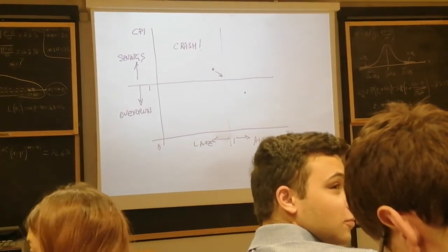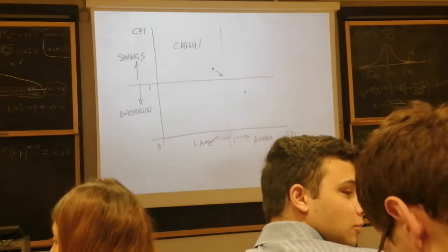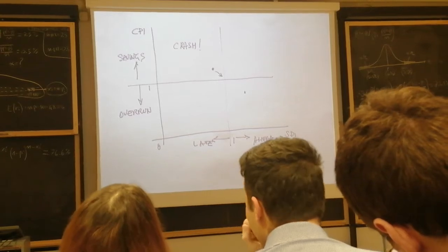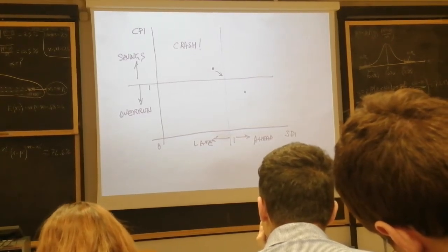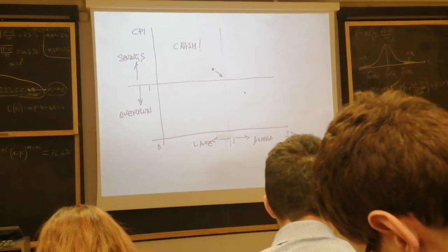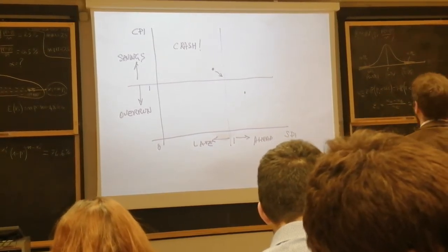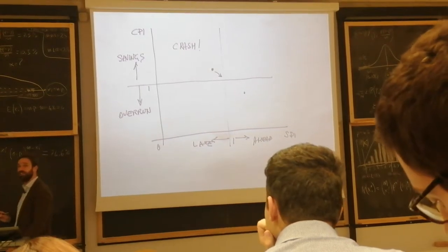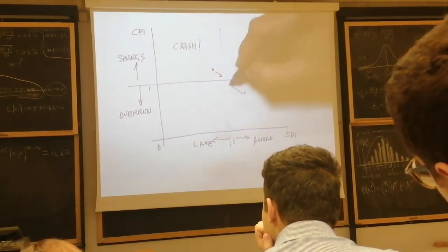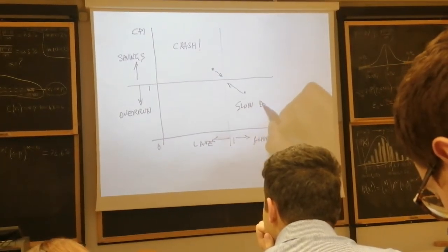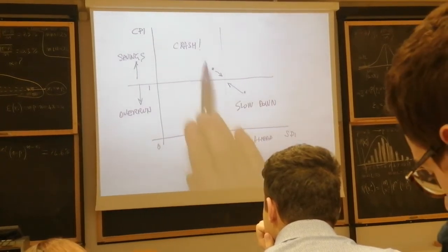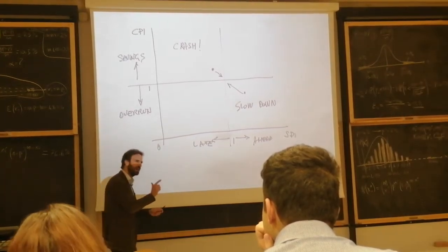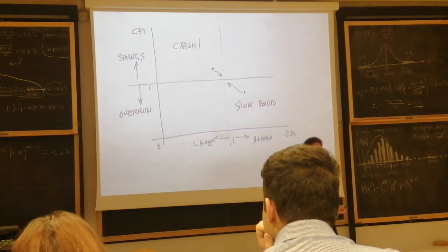So what can you do? Guys, slow down. You may say, okay, don't work at night because I am not paying you any longer for working at night. Slow down so that we can save money, but taking longer time. This is called slowing down, in fact. Be careful, slowing down is less effective than crashing, in the sense that in practical terms, in real life, you can always spend money to crash. But reducing expenditure to bring about time savings could be not that effective.